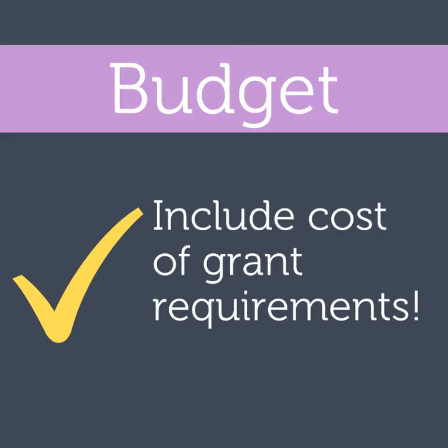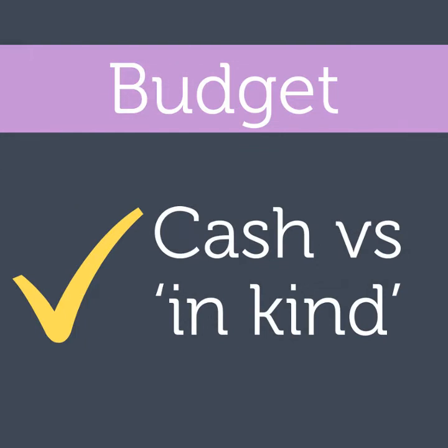Now, cash versus in-kind. The difference, in case anyone is not sure of cash versus in-kind: cash is something where you are giving them money. So you are actually paying money for something to be done. In-kind is something where you're giving up your time or some other resource other than cash. So if I am on a salary and I am going to do some work for the project, that's just in-kind. I'm already being paid.